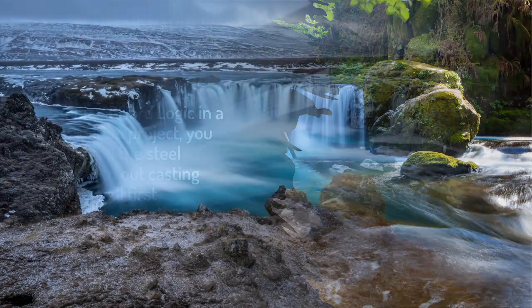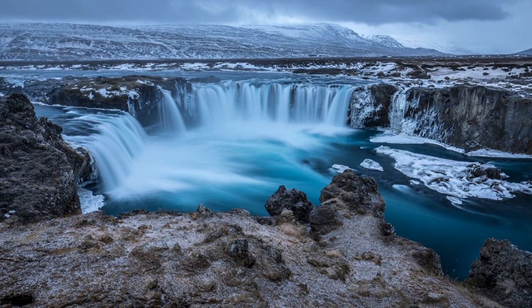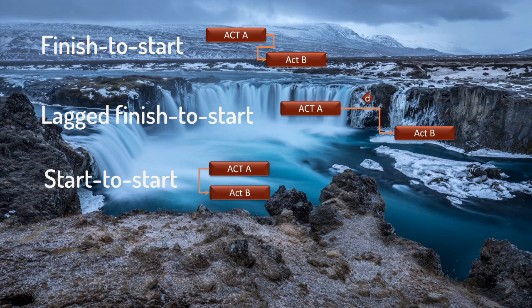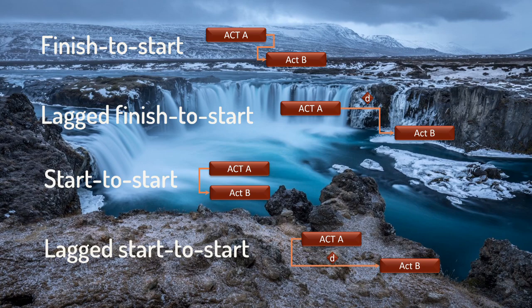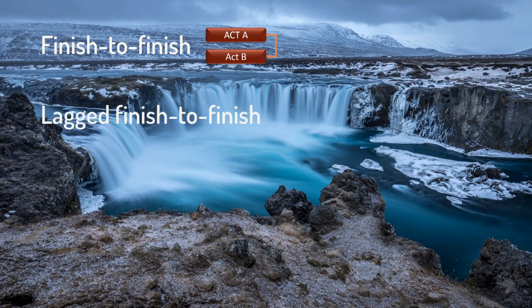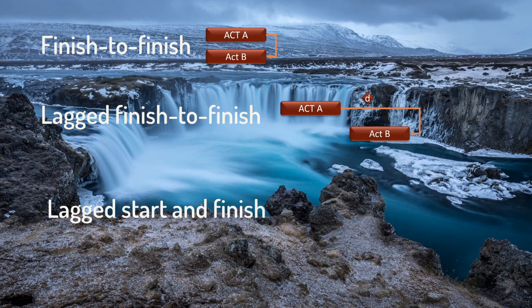The following common links are illustrated in the SCL Delay and Disruption Protocol. Finish to start, lagged finish to start, start to start, lagged start to start, finish to finish, lagged finish to finish, lagged start and finish.